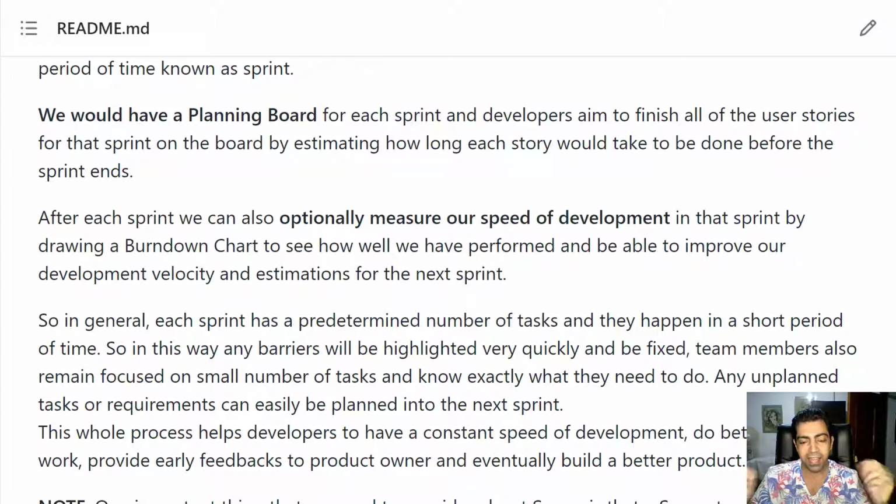In the middle of each sprint, some unknown issues may happen, such as some bugs or some requirements that your team realizes they need so that they can complete the tasks. We call these unknown issues unplanned tasks. Now, you don't necessarily need to change your plan for your current sprint. You can simply put any unplanned tasks in the next sprint.